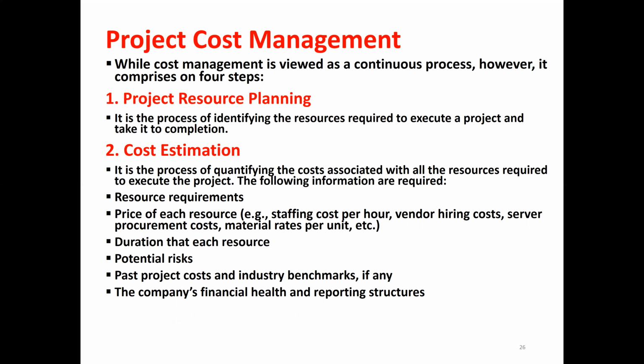Once we identify the resources, we prepare the cost estimate. Number 2 is cost estimation. It is the process of quantifying the cost associated with all the resources required to execute the project. The following information is required: the resource requirements that we identified in step 1, project resource planning, and the price of each resource, such as staffing cost per hour, vendor hiring cost, service procurement cost, material rate per unit, etc.